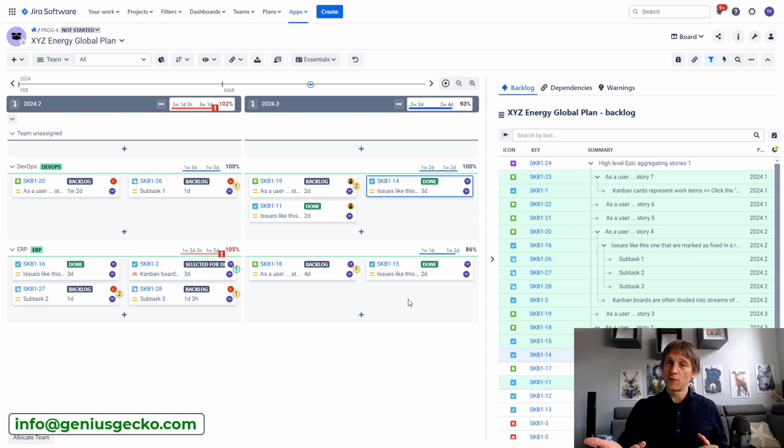The point is that you get the information regarding the planning and you can react to this information, right? So this is what we were looking for over here. This is how the planning from the resources perspective could look. And as you can see, this planning here in the board module is available only on a team level, right? So we can't plan on an individual level. I mentioned earlier that this board is dedicated to the Agile approach, and that's typical to the Agile approach. You are not doing the planning on an individual level, you're doing the planning on a team level, and that's what is doable and available over here.